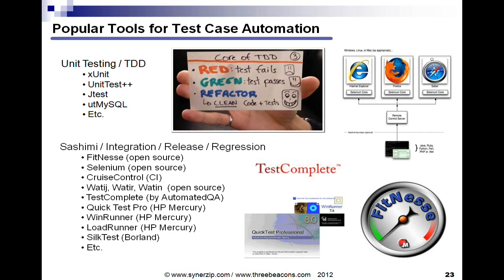Let's take another related question, Mike, on this one then. And what's the dev to QA ratio? Meaning, given the types of things that a QA is to do, what's the right ratio to be shooting for? Well, I find in Agile teams a good ratio is 1 QA developer to 3 or 4 software developers. So if you think about Scrum teams that are 7 plus or minus 2, you'll generally find 2 QA people on that team.